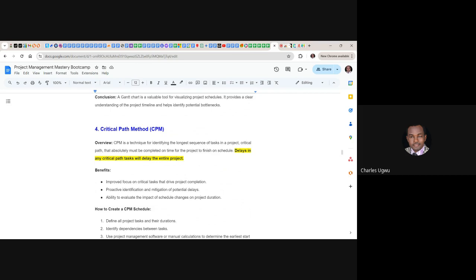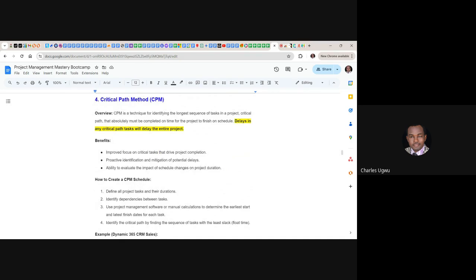So we need to identify all the critical areas, more especially dependencies, and be careful while working on those critical areas to make sure that if we are meant to work for 2 days there, then we work for 2 days, because those areas we can't delay. If you delay within those critical parts, it's going to hurt the whole project. That is the main message the critical part is trying to pass to us. Delaying any critical part will delay the entire project.